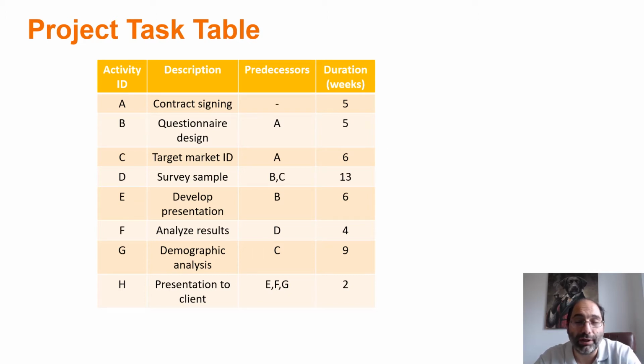This is true. I do need all the tasks to be completed, but remember that some tasks are going to be done in parallel. So just adding the duration of each task is not going to give me an accurate estimation of how long this project will take to be completed. So, are we ready? Let's go and do this.